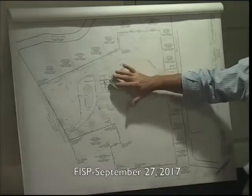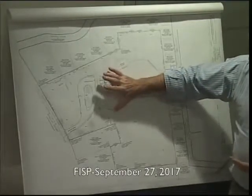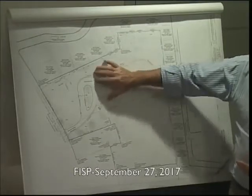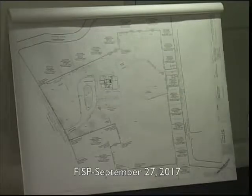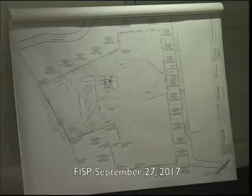As far as some stormwater areas, you've seen a memo, maybe, where we're within a certain number of years of the old municipal complex being here, so we may be able to use the roof and parking, most of the roof area, the paved areas around the school as our pre-development condition, in which case our post-development condition isn't going to be much different, which would mean that we will have far less stormwater management issues and cost. So it's one place we may be able to save some money.